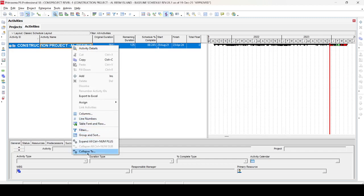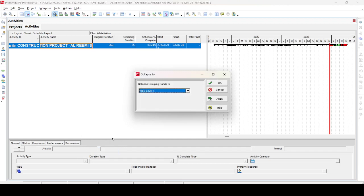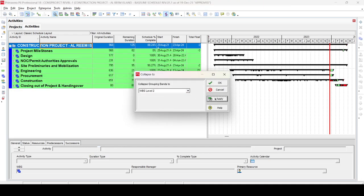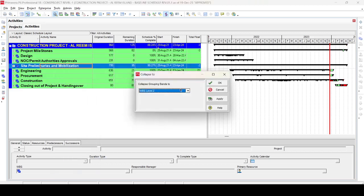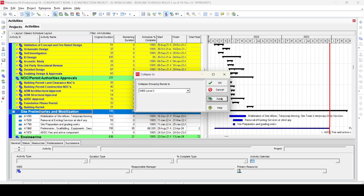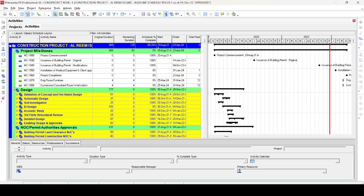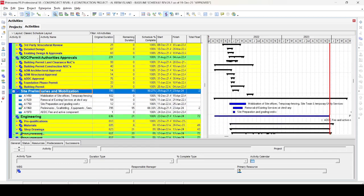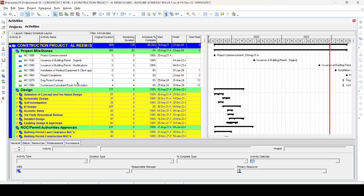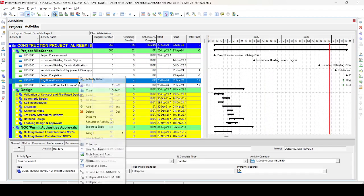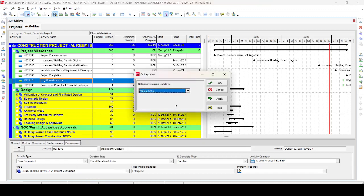The second way is to right-click and select 'Collapse to Level Two' — this will open the view up to level two. Similarly, you can right-click and go to 'Collapse to Level Three'. Whatever is convenient for you or fits your requirements, select the level accordingly. For demonstration purposes, I'll right-click here and go to Collapse to Level Two.